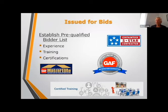Typically, we will send to our client a list of bidders we'd like to bid it to, 3 minimum, and the client may look at it, the manager may look at it and say, take this one off, add this one, that type of thing. But that's generally the process we go through for issuing it for bid, is that we work with you as the client and the manager.